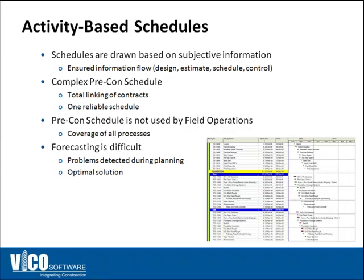We were thinking about polling the audience about how often pre-construction schedules are used on site by the superintendent, but we know the answer. Based on discussions with many of our clients, typically they don't necessarily use the same schedule during construction that they create during pre-construction.